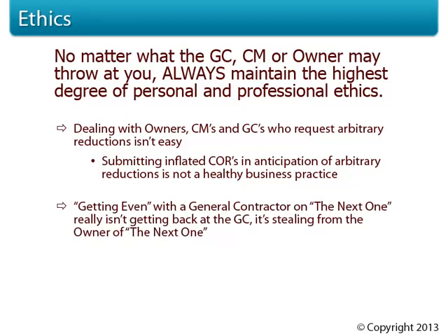A phrase that's really used way too commonly in our industry is, "We'll make it up on the next one." Well, getting even with the general contractor on the next one really isn't getting back at the general contractor. You're stealing from the owner of the next one. The vast majority of change order requests are paid by the owner, not the general contractor. So if you try to inflate change order pricing on another later project that you have with that GC, you're not getting back at the general contractor at all. You are literally stealing money from the owner of that next project.